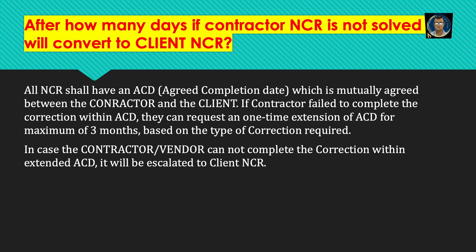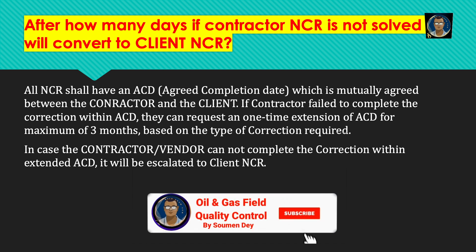After how many days will an unsolved contractor NCR convert to a client NCR? All NCRs shall have an ACD — agreed completion days — which is mutually agreed between the contractor and the client. If the contractor fails to complete the correction within the ACD, they can request a one-time extension of up to three months. If the contractor cannot complete the correction even within this extended ACD, it will be escalated to the client NCR — the next level of escalation.